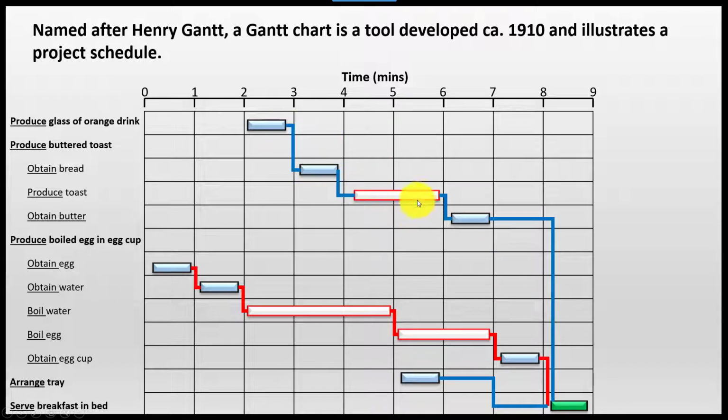We also have what is known in industry as the project paths. A path is what you see here in blue or in red. Now, why have I distinguished between these two colors? It has to do with the fact that one of these three paths is the critical one. The critical path is the one in which, if you have a delay in one activity, it is going to have an impact on the whole project.